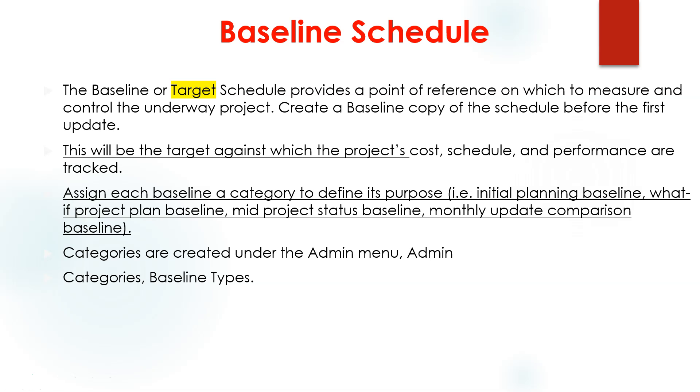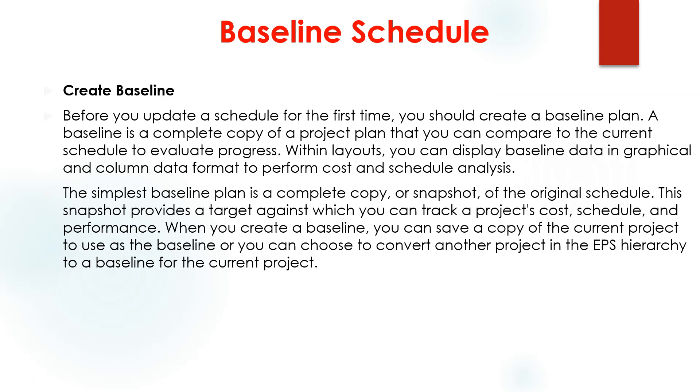How to assign a baseline to your schedule? I will show you guys this in a minute in live software. Before you update your schedule, please take a copy from your schedule, call it a baseline plan, and this is gonna be your reference that you will measure all your performance against.